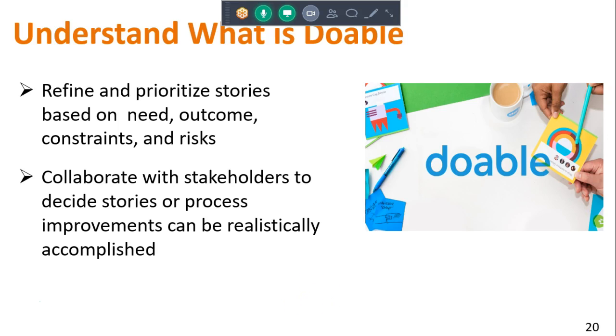It may be the case that you're going to have to discuss with your business users whether or not you can do something. One of the nice things about doing MoSCoW prioritization, and I've seen this, and more recently was exposed to this, was the whole idea of must have, should have, could have, and won't have at this particular point in time.